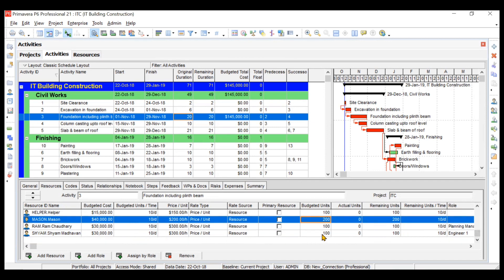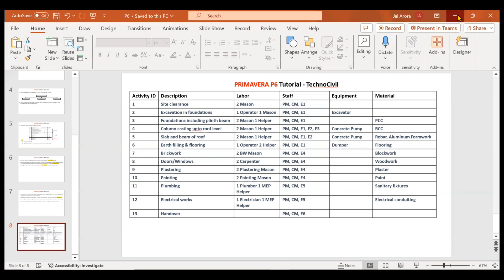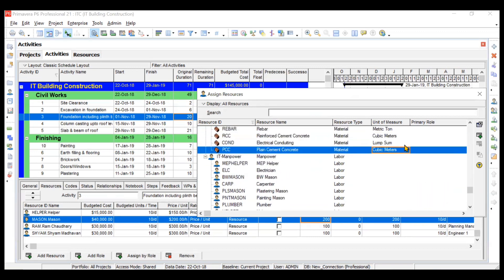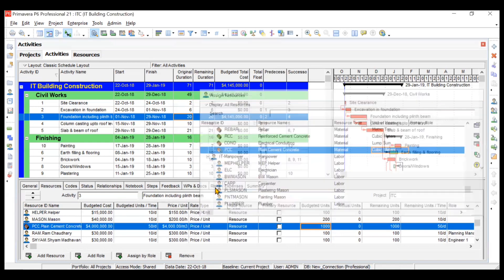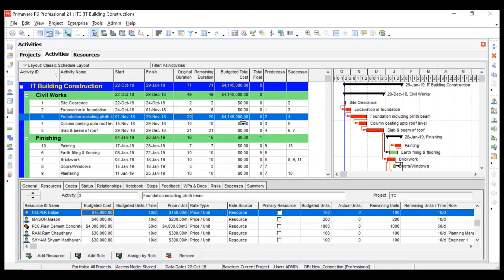One more resource is required — the PCC material. We will go to add resource and select PCC. It calculates the budgeted cost based on the material price, which we fixed at $4,000 per cubic meter, multiplied by the budgeted units. After assigning all resources, the total budgeted cost for this activity comes to approximately $41,45,000.